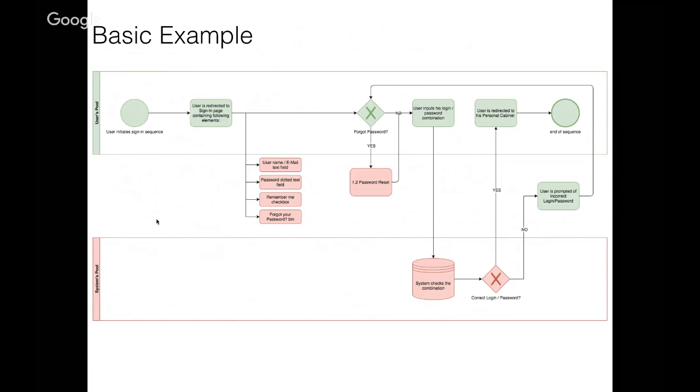The entire BPMN diagram can be easily decomposed into separate tasks for the development team, because as you can see, each part of it, each item in the list can easily be dragged into Jira or Redmine or whatever task tracking tool you might use, and be represented as a separate task or a separate epic at least, and easily be estimated, detailed, and brought to the team by the tech lead or a project manager or even a senior developer, I believe, with a middle-level one too, because BPMN diagrams are pretty easy to read and to understand.